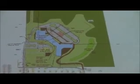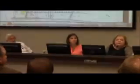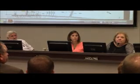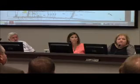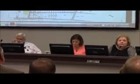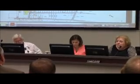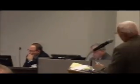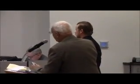What's the timeline on these? May 19th, 2017 is the complete building construction. Starting when? Yes, starting this fall. And then they're going to demo the existing building between June 1st and August 4th, 2017. And then the entire project is to be completed by August 28th, 2017 for the start of that academic school year.